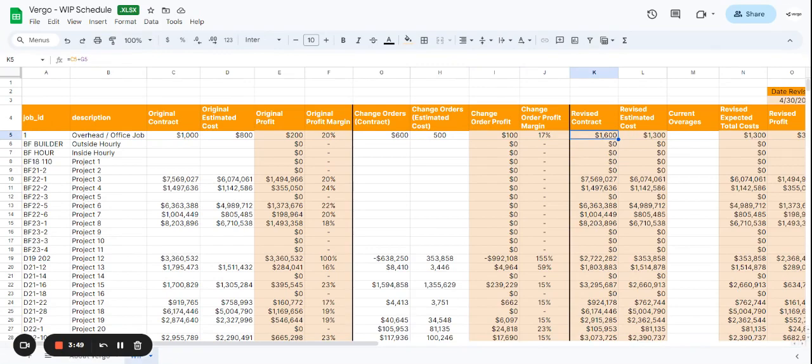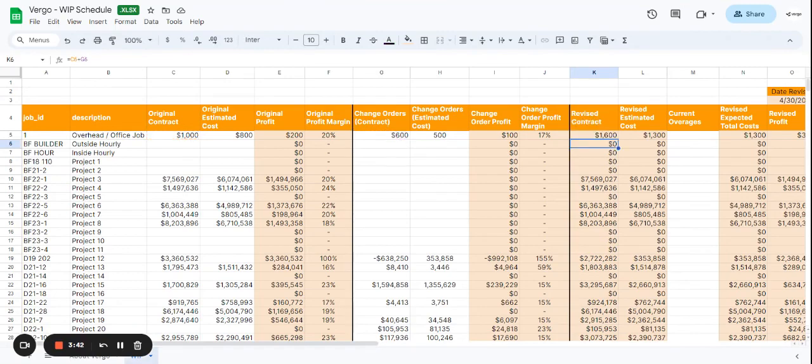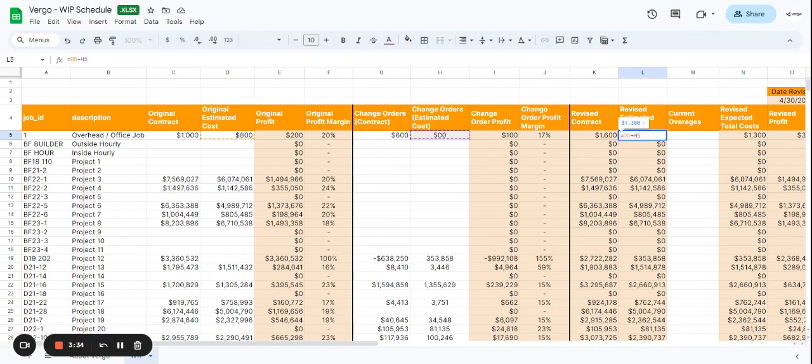And we have the revised contract, which is going to calculate the original contract minus the change order contract, and then it's going to give us $1,600. The revised estimate cost is going to be the original cost, estimated cost, plus the change order estimated cost.